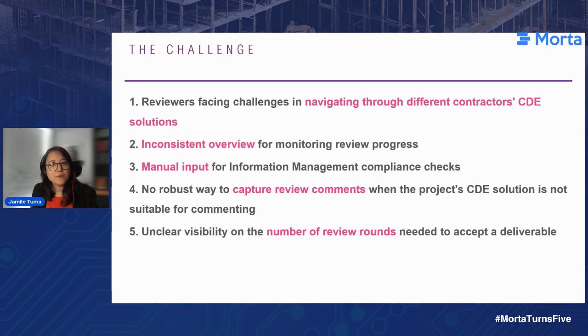Another challenge was no robust way to capture review comments when the project CDE solution is not suitable for commenting. We see this less and less now, but we still see certain CDEs that were not quite ready, and we can't really use them for commenting. So we needed some other mechanism. Excel gets messy and complicated, and it is difficult to control revisions, and again, Morta was a pretty good solution for that. Finally, there was unclear visibility of the number of review cycles or review rounds needed to accept one deliverable. This is also something that we didn't have a good understanding of, and now we should be able to.